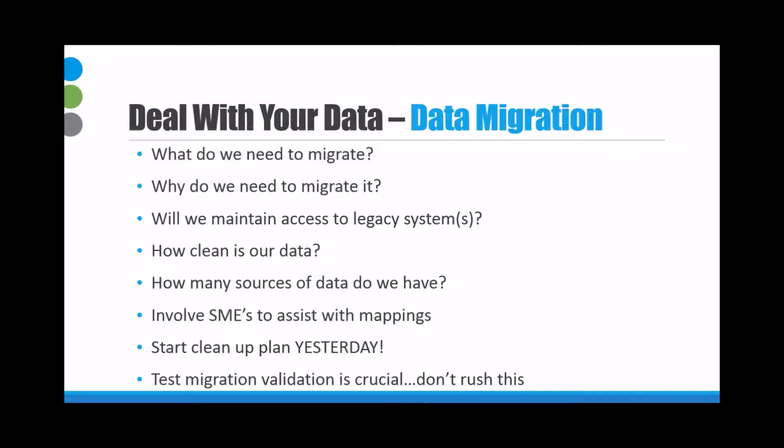And then the next step is that test migration validation is crucial. In the portion of the project where a test migration of the data is done, you certainly want to spend ample time. Do not rush this piece, and validate that the data is coming over as expected. It's going from the source system to the right place in the new system, and it's there and it's functioning how you want it to.